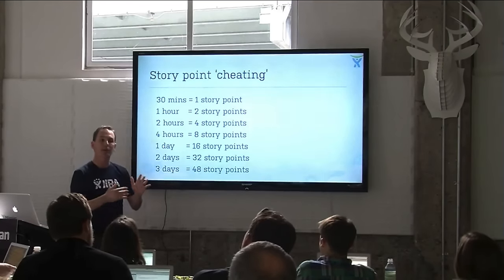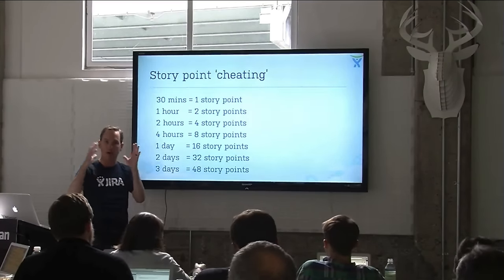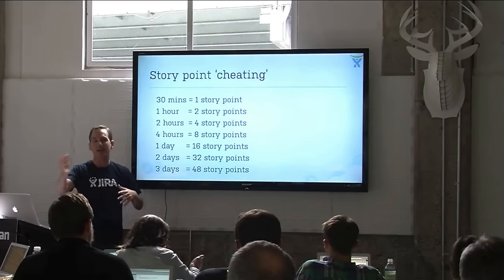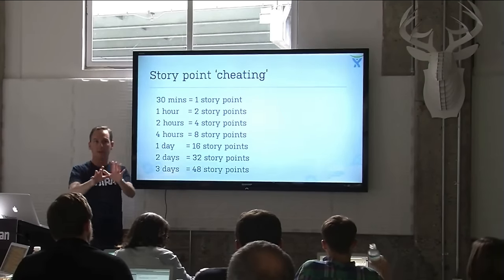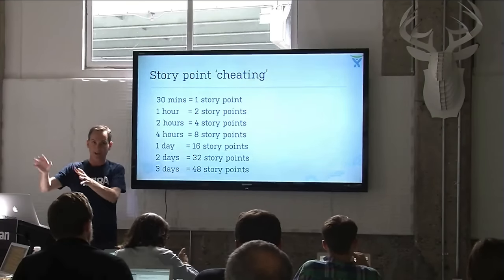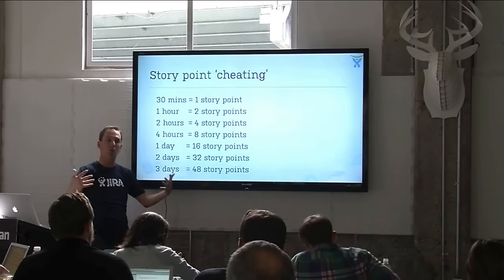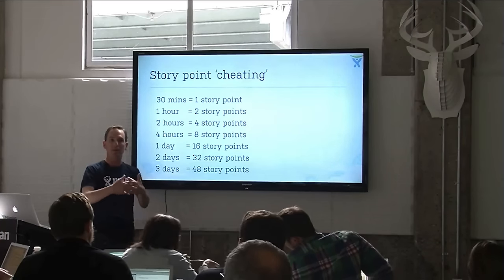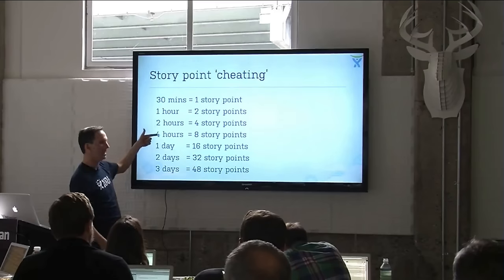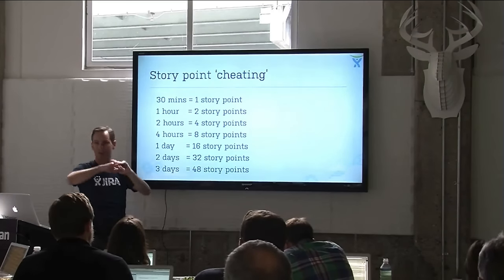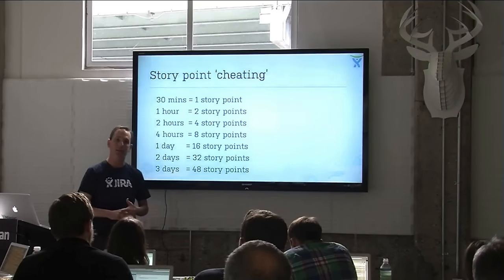There are a bunch of different ways to do it, but as you're figuring it out, you'll instinctively gravitate toward is it a half-day thing or a full-day thing? So just have a number in your head that means half day and full day. Because if you're mixing work between your team, it's important you're all using the same scale — if half a day to you is 8 story points and half a day for someone else is 27 story points, your team's mixed velocity won't make sense.